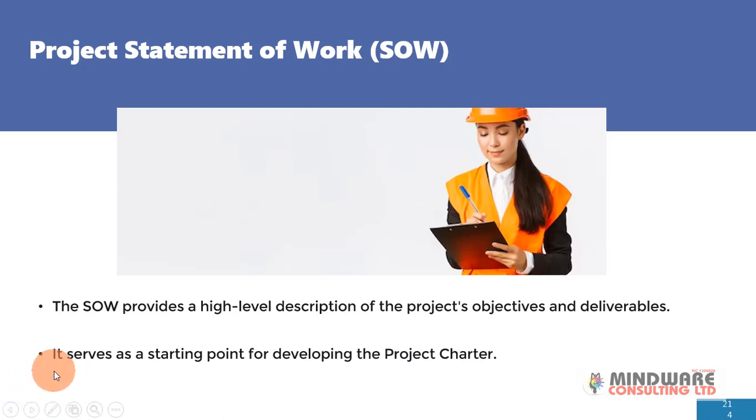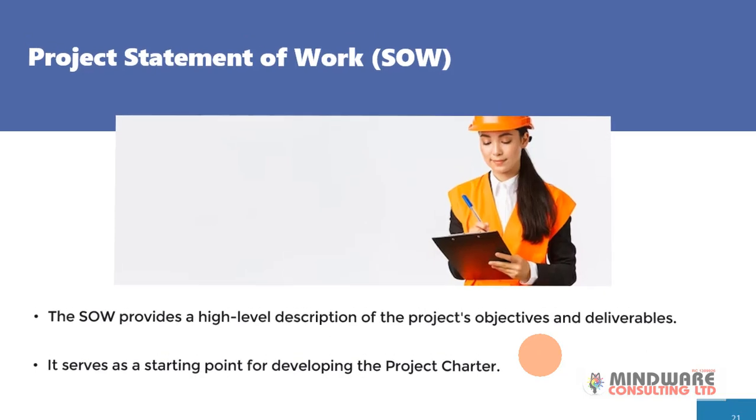The project statement of work serves as a starting point for developing the project charter. So before you develop your project charter, you need to have a statement of work. What are we trying to do? That will help us in developing this document. That's why it's part of the input.